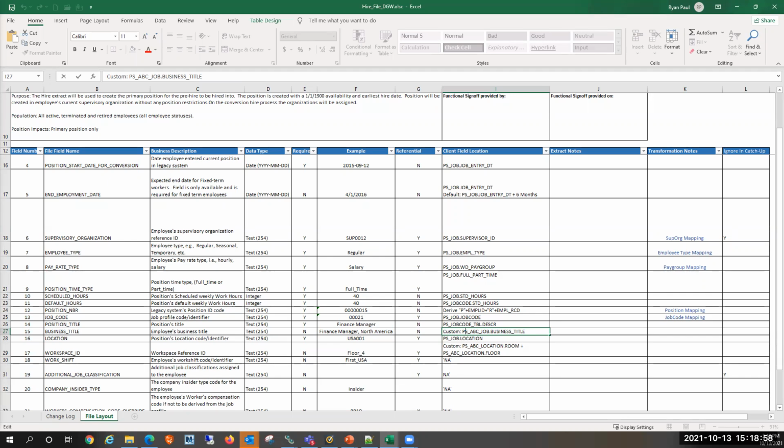Is it, oh, we don't have enough subject matter experts to go around because it's year end when we're going to be doing this, that, or the other. All right, well, that's fine. We can help support that. We can just throw another FTE in there to do that support. So you can work with your partner to figure out the best balance of resources so you guys can still own it at the end and you're not solely reliant on the partner when they're done loading the data, and you're ready to flip the switch. But again, that's a balance with deeper internal conversations around that process.